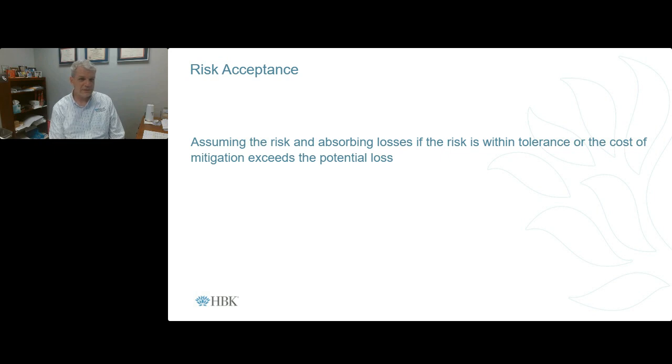Now, again, risk acceptance. One of the things that's going to come into play there, and I talk about this a lot too, if you've heard any of my other webinars or speaking engagements, is that you have, I always call it the scales of justice almost, where you have your cost-benefit. You always have to keep that in mind when you're doing controls: the risk that you're trying to control, what's the likelihood times the impact, what's that likely result going to be, and how much is it going to be?